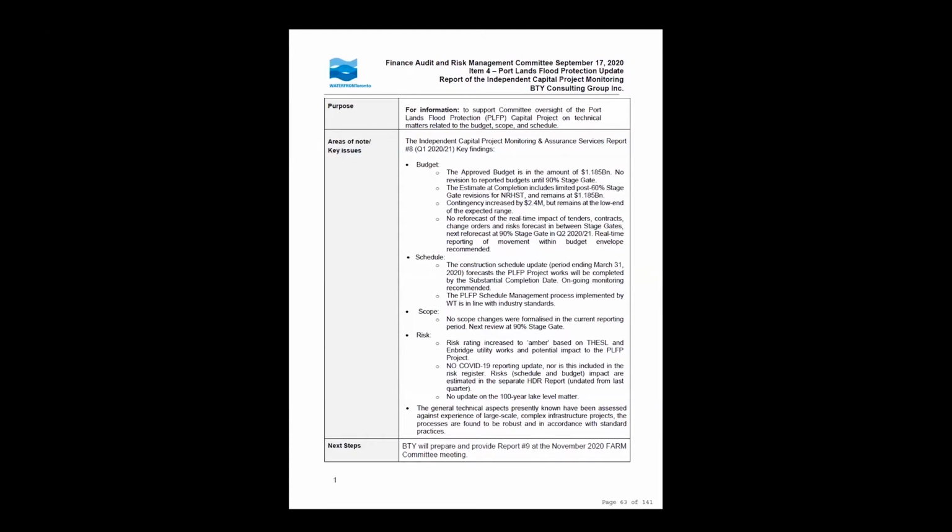Hi, so this is Joanne from BTY Group. So pretty much this is a fairly straightforward report. There were no significant concerns. We've flagged related to budget, particularly a matter regarding the estimate of completion. David and I have had some dialogue about that, and we've resolved how that will look on a go-forward basis. So we're satisfied with that matter. Schedule, we noticed that there was some trend of slippage, but overall there is sufficient float, and so we have no concerns about the position of that at this time.